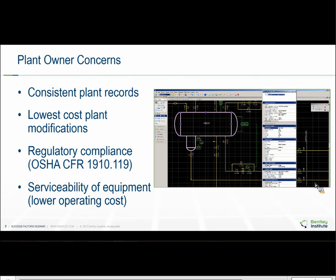For example, records management is more critical than ever. At a minimum, accurate documents like P&IDs are a legal requirement. Owners also have to consider the impact to downtime during plant shutdowns when plant records are found to be incorrect or out of date. This adds to the scope of work and often the length of an outage.